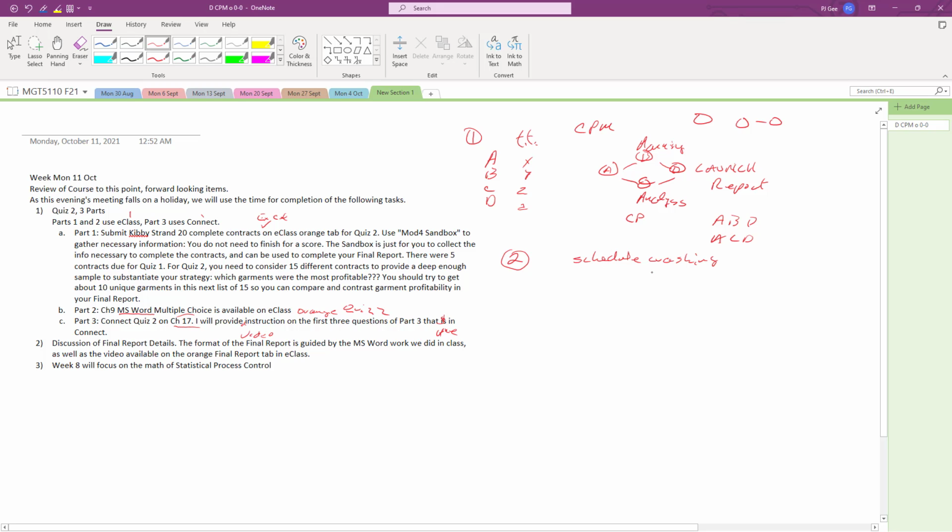But when we schedule crash, that means once we analyze the network, usually the question is, how could money change that? If a customer pays, could we speed up any one or some number of the tasks in order to get it done quicker?